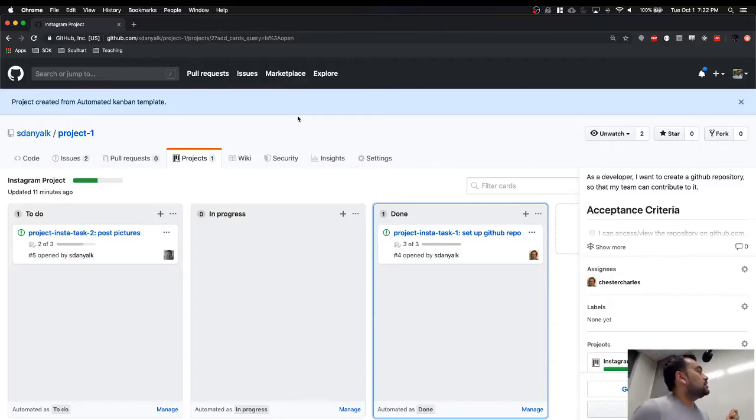So, for example, if I'm working on a task today, I'm going to say, well, yesterday I worked on my GitHub repository, set it up, and everything is good. Today, I'm going to pick up a task from my to-do. I'm going to start working on that. Are there any roadblocks? Yeah, I was looking at that API. I spent many hours, but I can't figure it out, so it's a roadblock. I need help. Now, you don't jump into help at that point. We go to the next person. The next person answers the same questions, then the next, then the next.